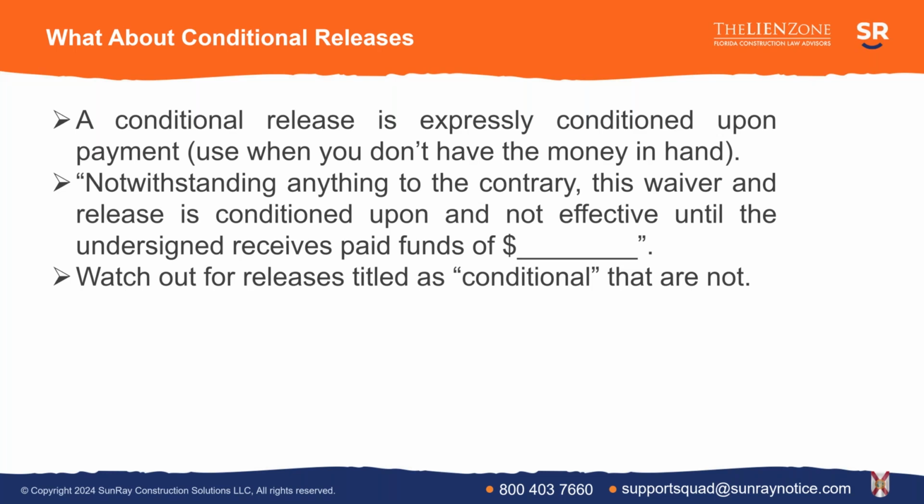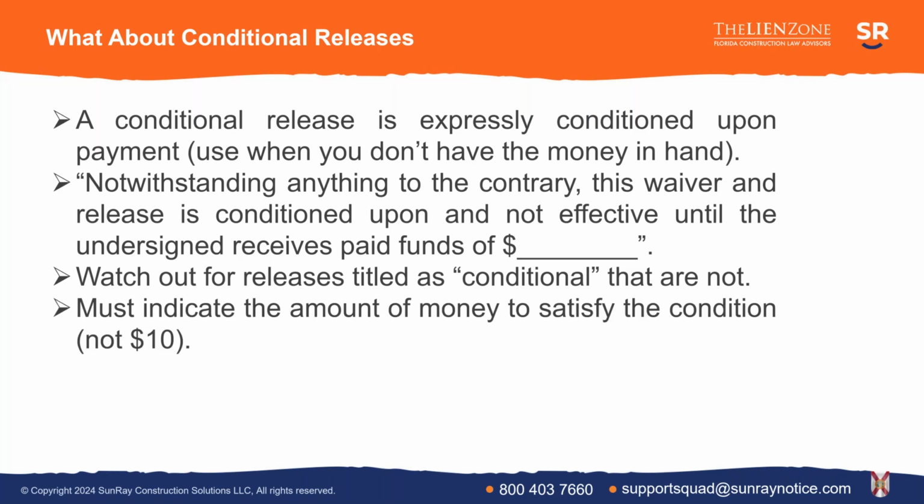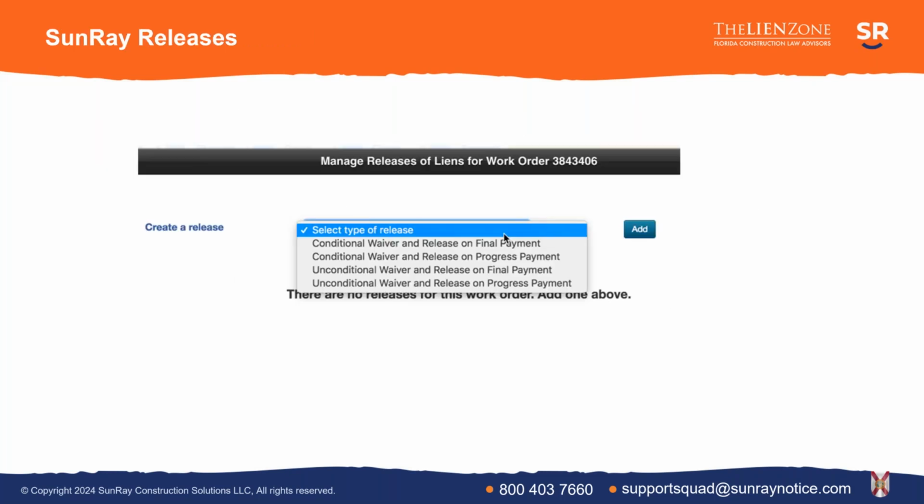Be very careful for releases that are titled conditional. So the title of the release is conditional partial release of lien, but it has no conditional language in it. That's not a conditional release. It has to have language that expressly makes the release conditioned on you receiving a specific amount of money. And back to our $10, you can never have a release that's conditioned on $10. A $10 conditional release is conditioned on you getting $10. And I'm assuming that you're giving releases in exchange for a lot more than $10.